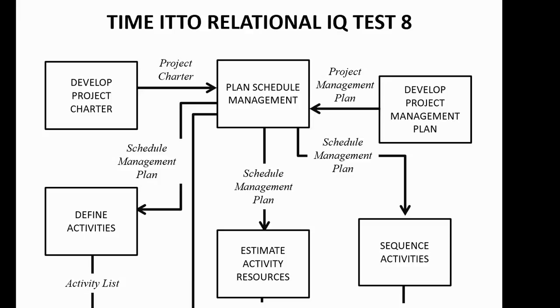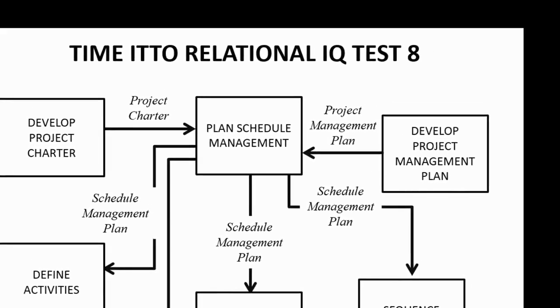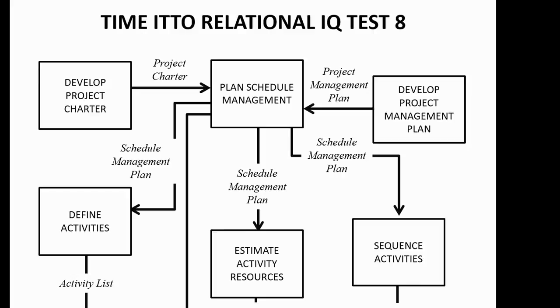It depends on your project, really, right? Sometimes you need to, in MS Project, go down to the minute, sometimes down to the second, and have everything meticulously planned down. And in other cases, you don't need to go that far down. You could keep it high level at one day, maybe even a week or a month. So the level of detail in your schedule needs to be determined up front. It needs to be done in an intentional fashion, and that's why we have the plan schedule management process to guide us on how to schedule.